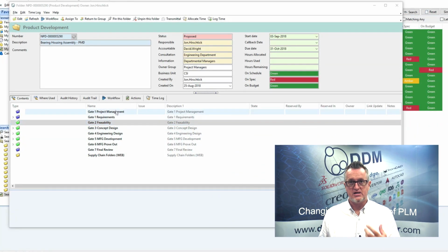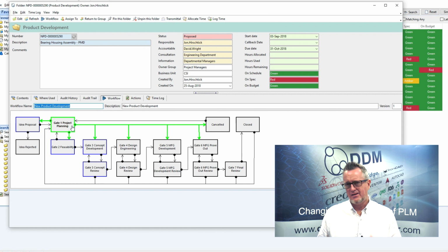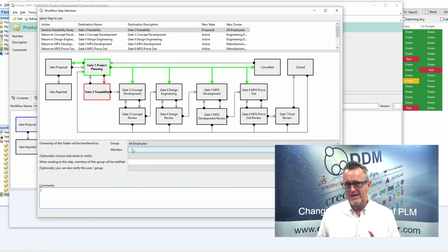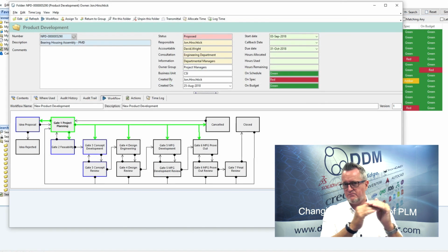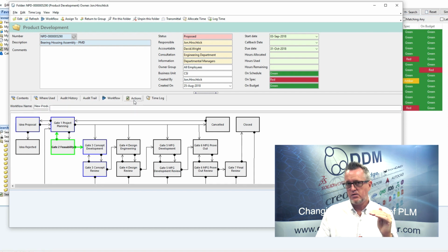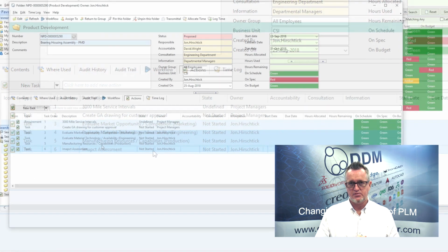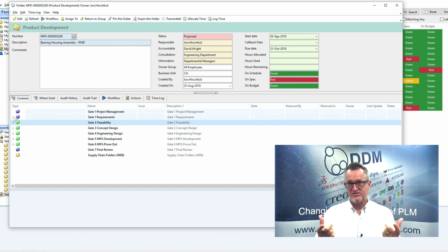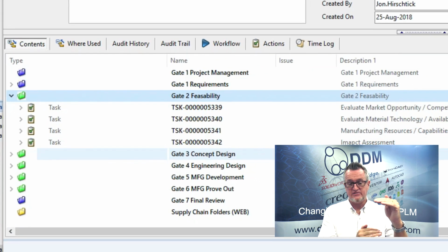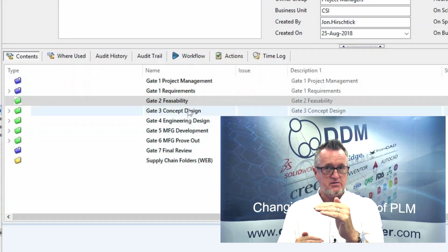So if I was working on a change order and I go to the change request approval, look, we found a problem, we need to raise the change order and it's going to have to be sent to somebody or a group of people, and they're going to say yes or no as to whether we're going to make that change. Now, in order to make the change, they're going to do an impact assessment. So whether it's just a single department impact assessment or whether you're doing an impact assessment across all departments, what we can do here is at the point when you send your change request to the change request approval, you can automatically have the system create a task or a series of tasks for those impact assessments to be done.